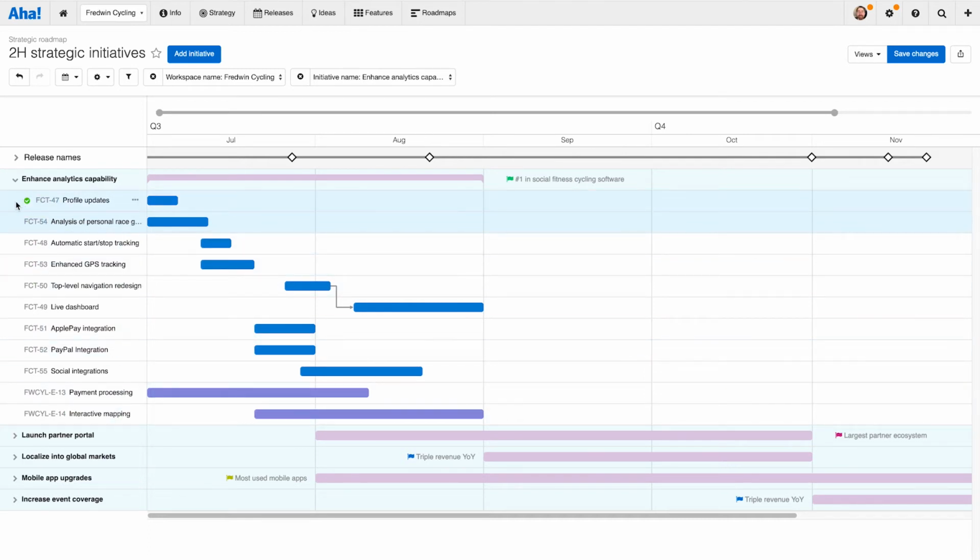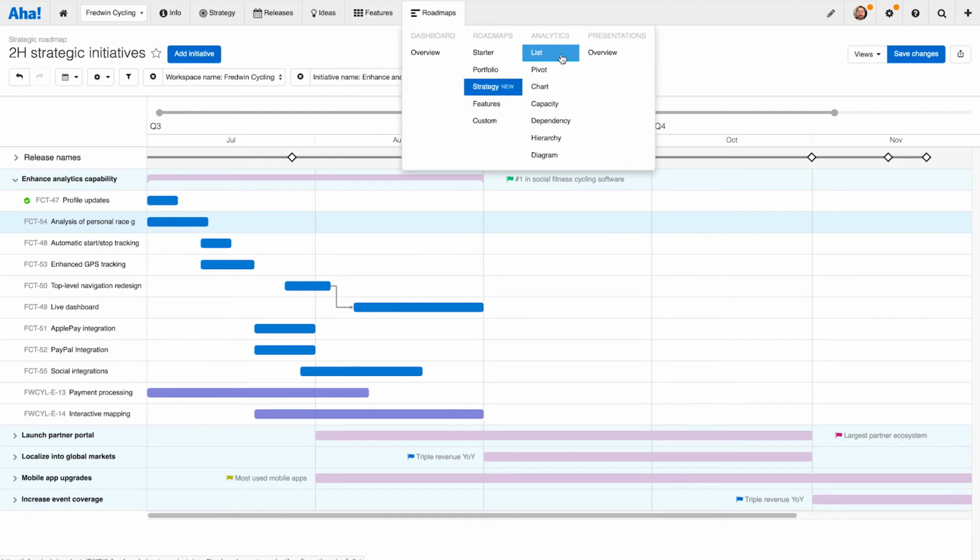If you are trying to use this roadmap and you see one being really empty, this is probably the case. We probably have records that aren't linked to those strategic record types, which is actually a really good exercise. Before you start getting really busy and being excited about being busy, it's good to know why you're doing what you're doing, and this is an exercise in that. Don't worry if you have hundreds or thousands of features, you don't have to link them all one by one. You can jump up to the features list page or the roadmaps list report. You can create custom list views, kind of like spreadsheets, only much more powerful, in either of those screens. And you can bulk edit.